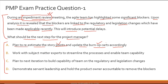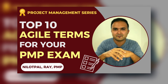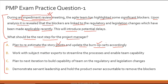Option A: plan to re-estimate the story points and update the burn-up charts accordingly. There's a lot of technical jargon here — story points, burn-up charts — so it's important to focus on these agile terms and concepts. If you re-estimate story points accounting for delays — say a story point that was three weeks now takes five weeks — and update your burn-up charts, what good will it do?